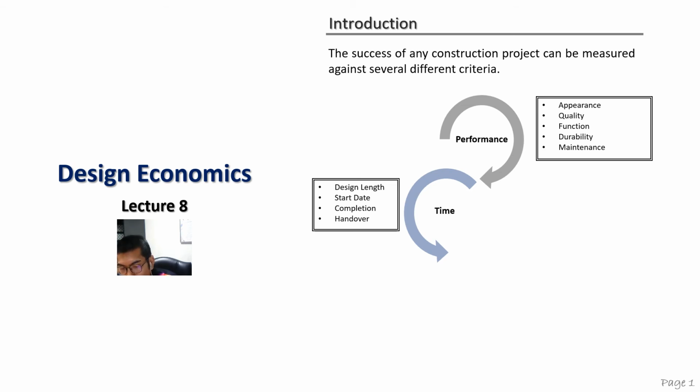There are a lot of factors why our projects cannot be completed on time. Some of them are because you are not doing things rightly during the design stage. You have a lot of problems with your design. For example, your design is not satisfactory to the client. Sometimes the design is okay, but suddenly the client would like to make changes to the design. It could happen.